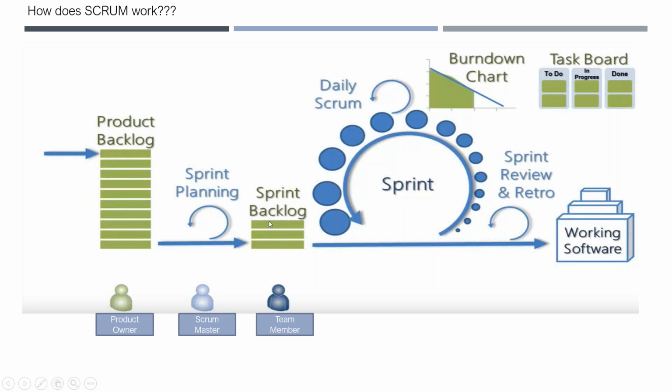Here you have some subset of requirements, 10 requirements, which are assigned to the people, and the effort estimation is also done by the team members. Let us say this requirement takes 2 days, this requirement takes 10 days, 3 days, etc. That kind of planning will also happen. So at the end of this sprint planning, you will have the sprint backlog. It happens in 1 or 2 hours, and the people will start doing the development.